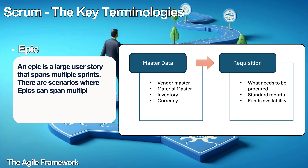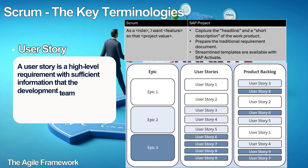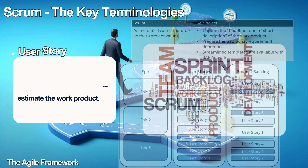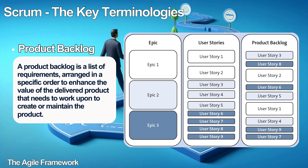There are scenarios where Epics can span multiple Scrum teams. An Epic can generally come from a client or arise due to system requirements. A user story, on the other hand, is a high-level requirement with sufficient information that the development team can use to estimate the work product. Per Scrum, the user story has a role, a feature, and a benefit. In SAP, we capture the headline and a short description of the work product, and also prepare traditional requirement documents and streamlined templates. A product backlog is a list of requirements, also known as user stories, arranged in a specific order to enhance the value of the delivered product. It is managed by the product owner, and there can be only one product backlog for a product.